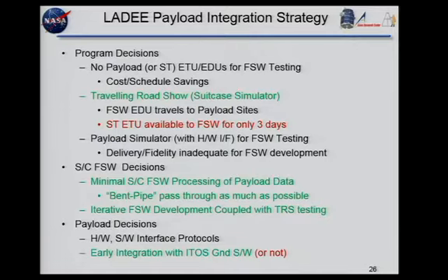So we decided to do this traveling roadshow, or some people call it a suitcase simulator, where I would take an early EDU of something that represented the flight software hardware, and take it out to the different sites, plug it in, and see what it did, see if it worked. Then we iterate over that a few times. We did that a lot with the payloads. The Star Tracker probably would have been good to do that with too, if we weren't going to buy it.